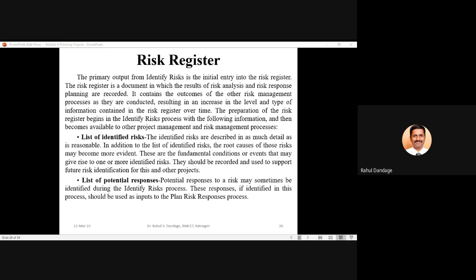So during the risk identification stage, it is always advisable that once you identify a particular risk, you try to define its characteristics. We should try to list the various root causes of this particular risk. We should be able to give the probable effects of this risk on the project objectives, and at the same time document the possible risk responses to the risk category identified.